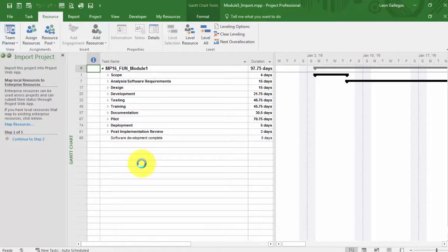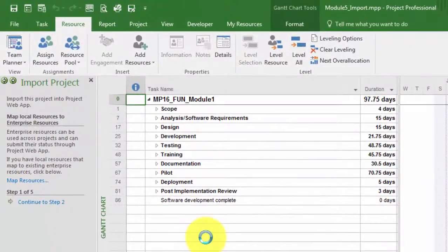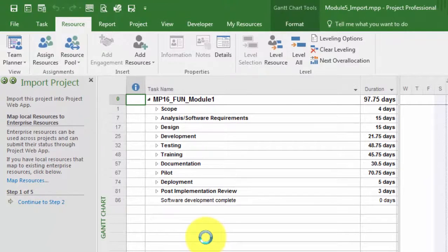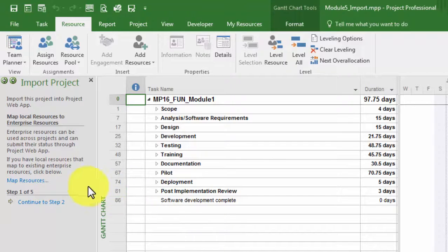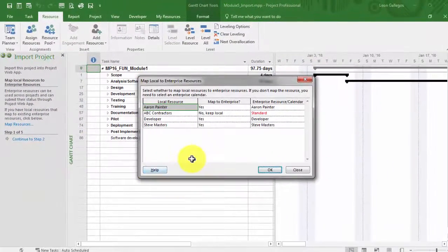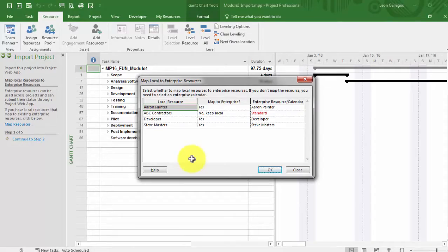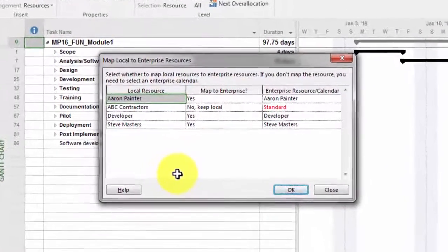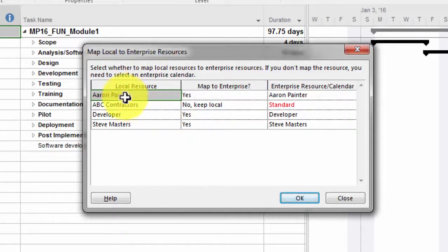It's going to be looking for some very specific areas that we need to address, and those two will be the resources that you have within the project schedule and any customizations that you have created or performed against that schedule, particularly around custom fields. The very first thing it's looking for is saying that you have or potentially have local resources in this project. You want this to be an enterprise project, yet it's loaded with resources. So the first thing you would do is map those. I'll click Map the Resources. The project is pretty smart; it can actually recognize the resource that's both in the enterprise resource pool and the one that you have locally, and the reason for that is it's simply matching up the first name and last name.